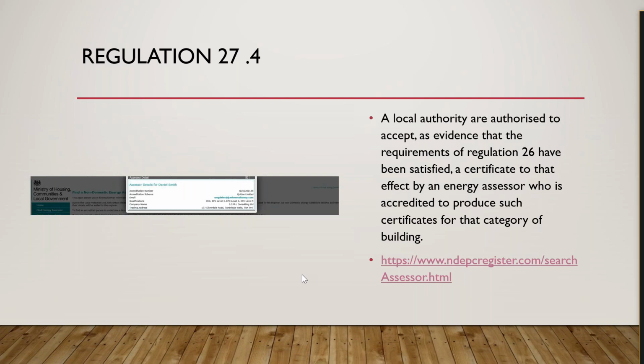Obviously, when a first design BRUKL is produced, it is advisable for the person who does that first BRUKL to carry it through for all the stages, because then you can get continuity throughout the project. A lot of the time, the design changes quite a few times throughout the project, and if you keep updating the BRUKL as you go, it saves a lot of aggro at the end.